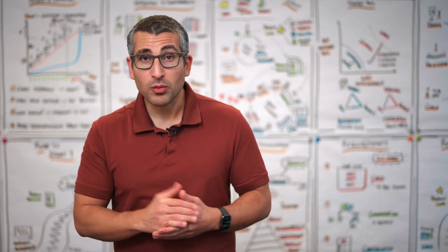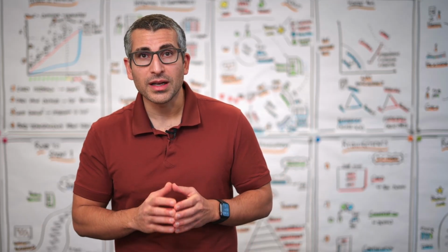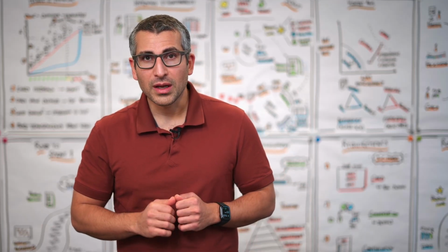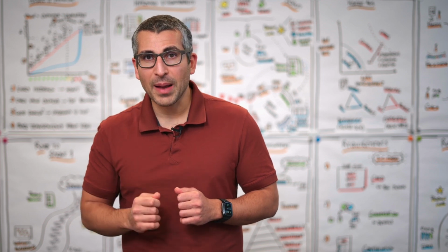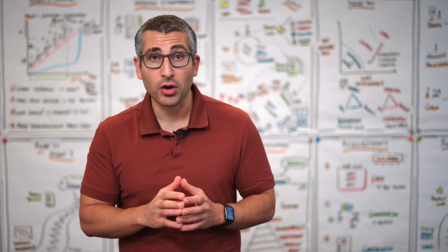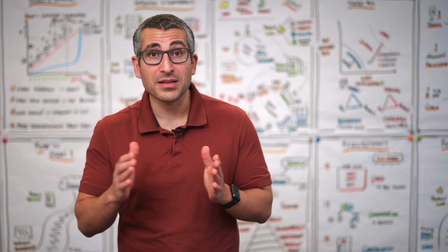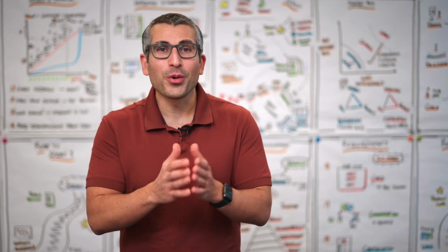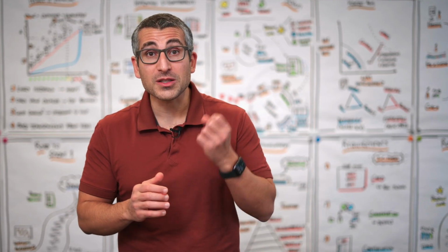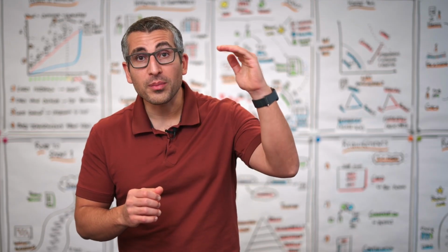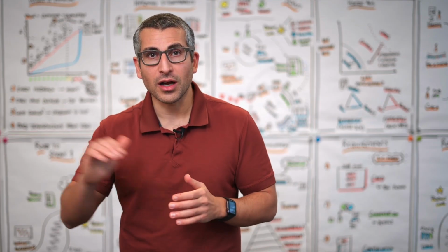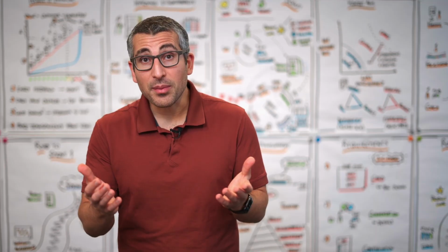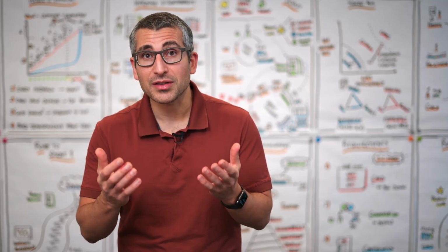The third principle, which I believe is very important, is optimizing flow. This is about inspecting and adapting how the system is working for you and how you can optimize the flow, how you can increase the pace or reduce the time that it takes for one specific item to move from the top of your backlog to the done column. This is something that we can do through retrospectives in Scrum.